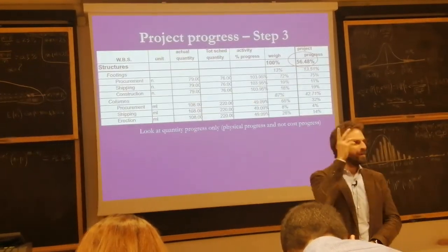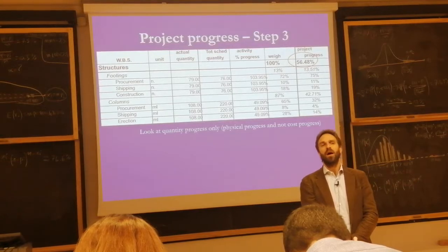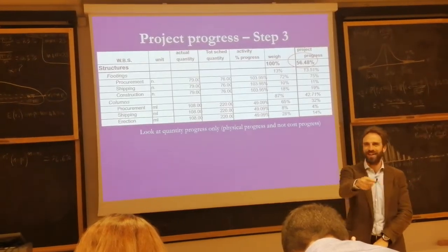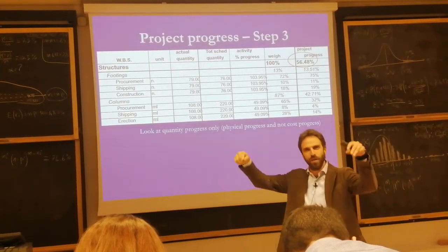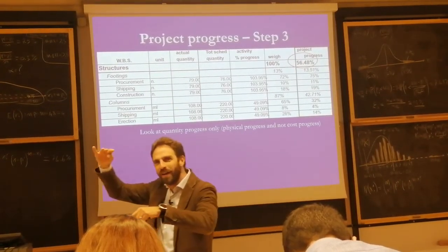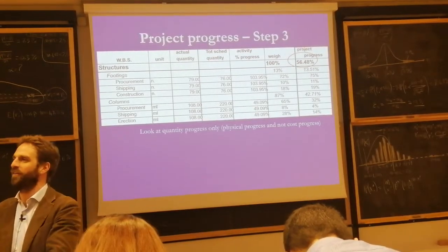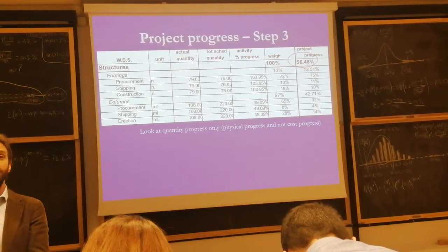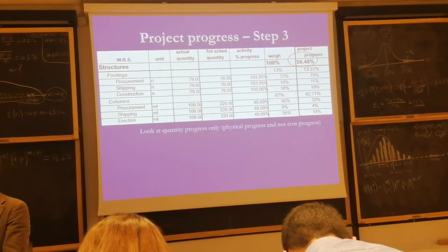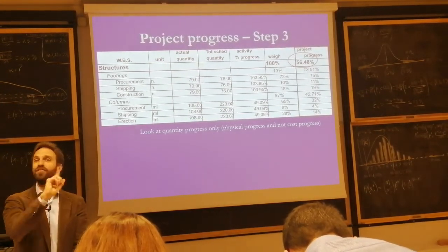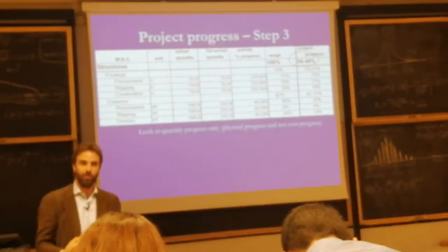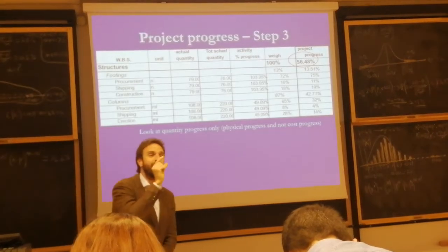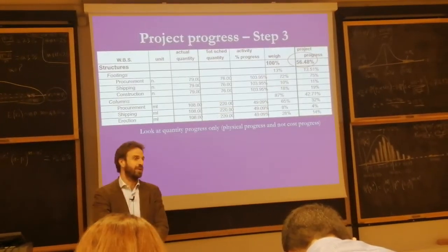And now Mr. Distribution is saying, "I'm not paying the 3 extra, because I told you there was the need for that huge machine to be placed at that point on the flooring, so we need more structures on that side. It's your problem. You pay the extra." So there's a change order that is not activated by the client. There's a change order from our side and we need to pay for it. So we need to include that extra work into the contract.